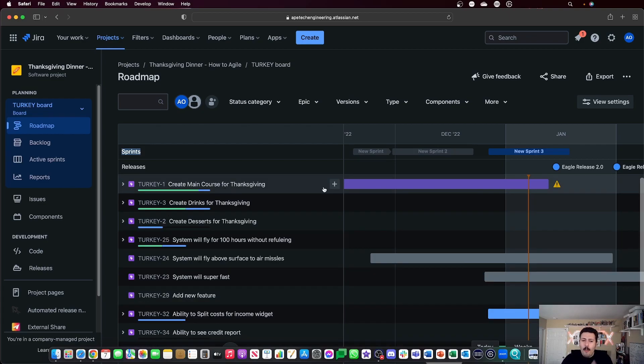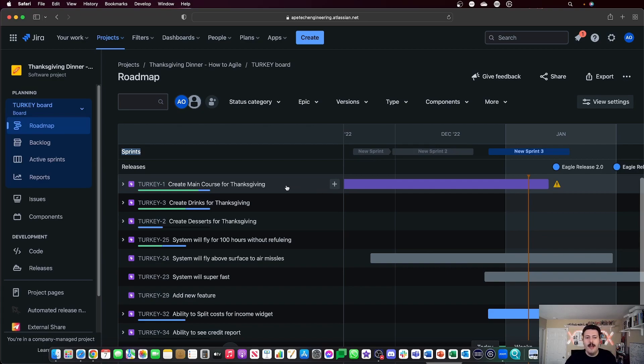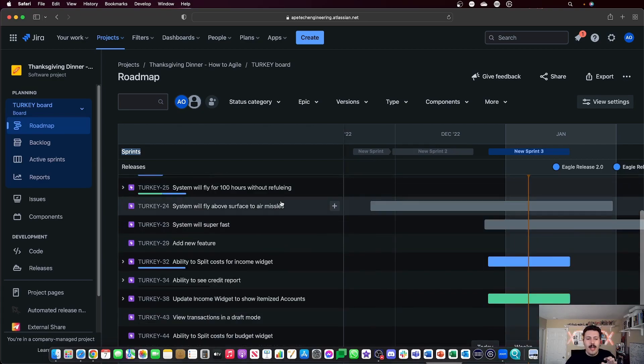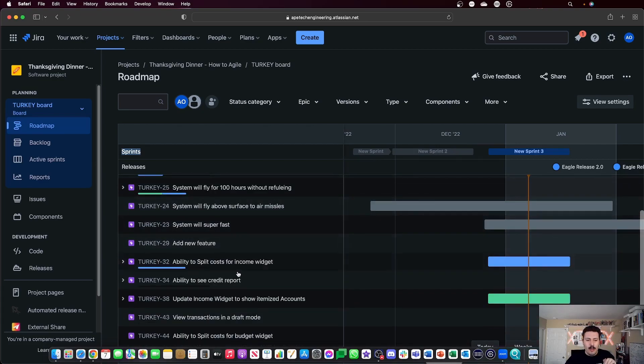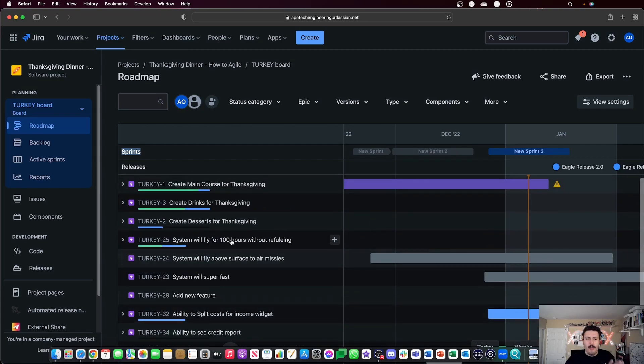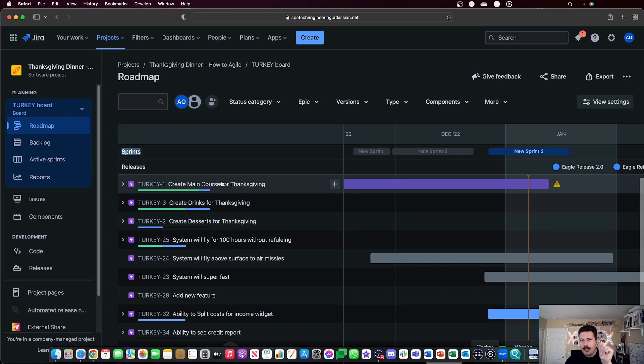It would be silly to have a start and end date that is outside of the scope of the sprint because then we're not doing agile correctly at all. So the stories, while you will not see a bar, you will still see the sprint up above and you'll know the soft dates on when those stories and tasks and bugs should be completed.